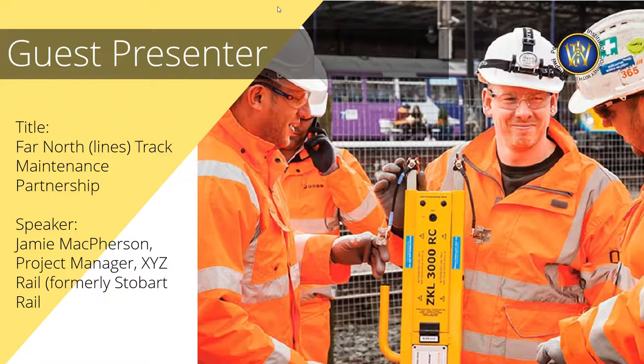I remember week 32, 33, year one, at Ross Keane, re-sleepering, because that was an area where the track time at night was around 10:30 to 4 in the morning, with limited access as well. So we utilised that disruption and worked back-to-back 10-hour shifts in order to install sleepers, but not any kind of blockades. We never got the opportunity.